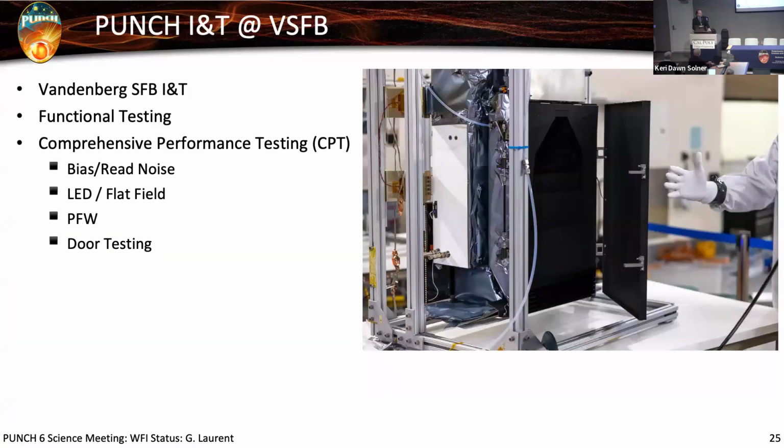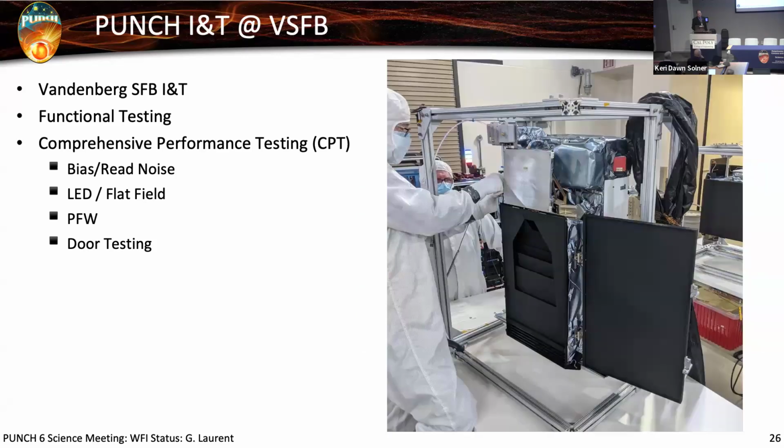So again, at Vandenberg, we perform an abridged set of tests. We can't really do optical testing due to schedule constraints and laboratory constraints, since we have to play nicely with Spherex. But again, read noise, bias, LEDs, polarizing filter wheel, and a door open test. Just another image showing the door open test here.